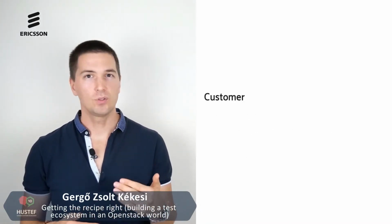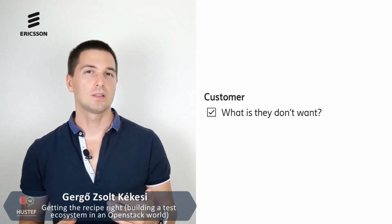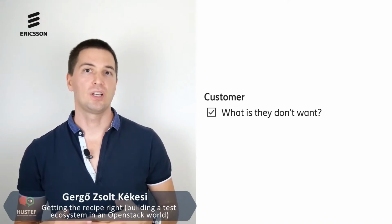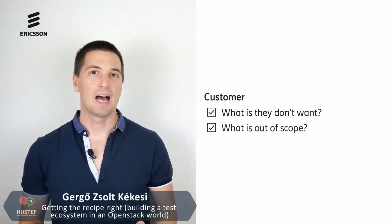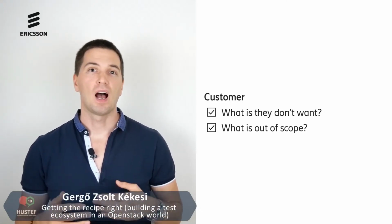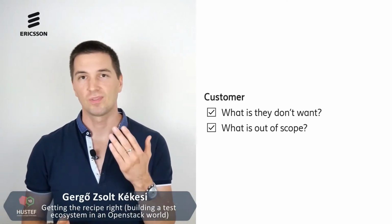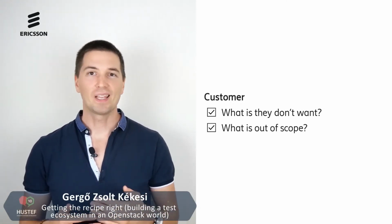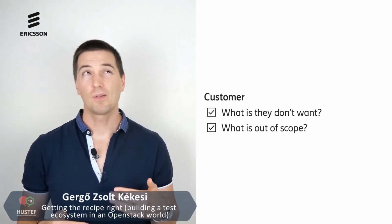Now that I know what they want, I have to be sure they know what they don't want. I don't want them ordering pasta and then changing their mind just as I'm ready to plate it. I write down everything that is out of scope. I've had to restart the conversation too many times. You've had it happen too, right? When your customer says, "I didn't think about it earlier, but now I think I need..."